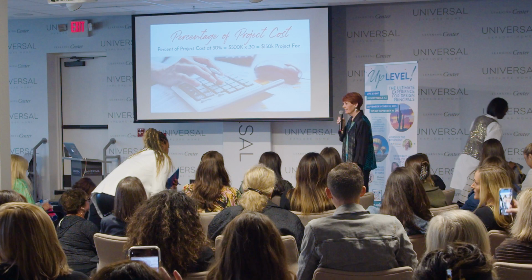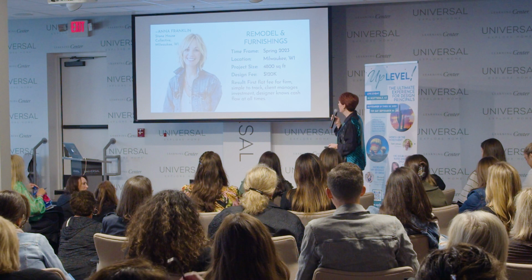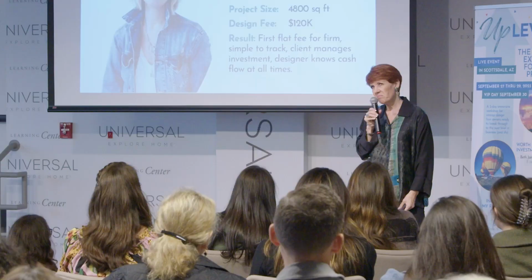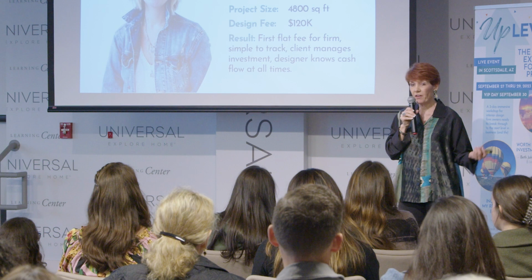It's a square foot method. Anna. Love working with Anna. Totally fun. In Milwaukee. And this was her first flat fee project. Now, Anna gave me the 4,800 square feet, and we talked about, you know, 20, 25. And she goes, "Well, I'm good if it's, you know, 20." And I said, "Well, hang on a minute, Anna." Because she was coming in around 80,000. I'm like, "Anna, for what you're doing, I saw the scope of work. I think you need 25 a square foot." So she went to 120, presented to the client, no pushback whatsoever. I'm like, oh, really? We could have gone more?